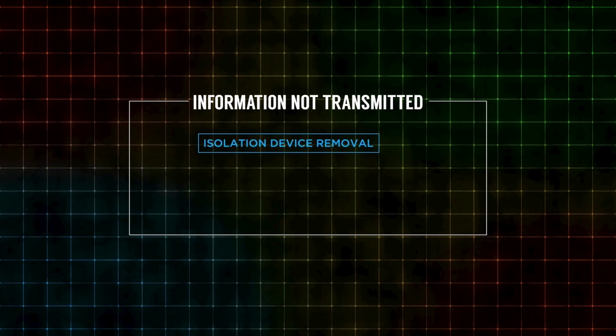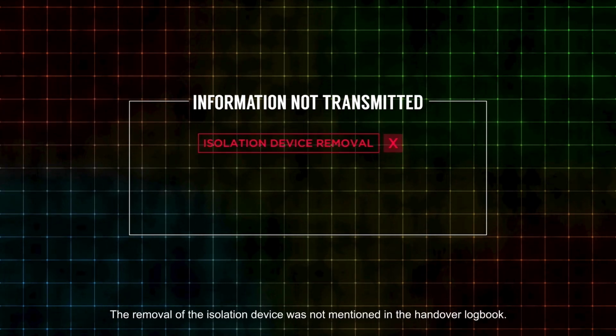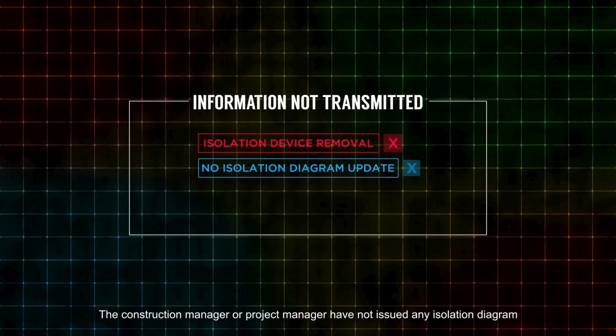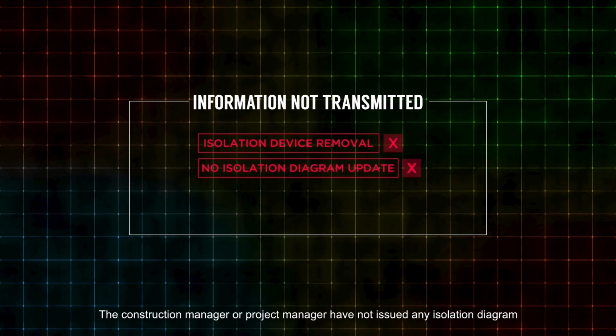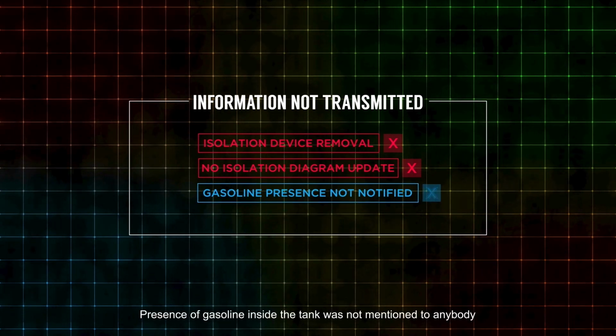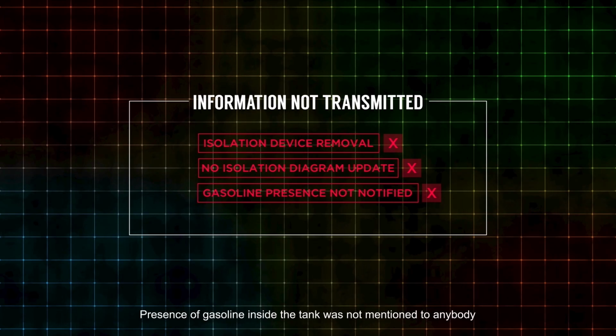The necessary information were not transmitted. The removal of the isolation device was not mentioned in the handover logbook. The construction manager or project manager have not issued any isolation diagram. Presence of gasoline inside the tank was not mentioned to anybody.